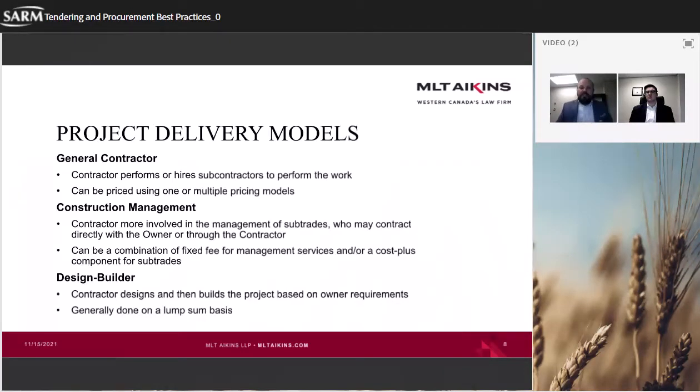And in that case, and in the case of a standard construction management, kind of typical construction management methodologies, they're kind of providing the white collar version of construction. And really what they're talking about is project management, some procurement help, some budget management, and some supervision. But construction management in itself isn't really about the actual execution of the work.